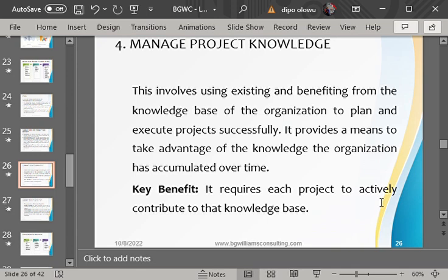Is it in alignment? Let me analyze it. What is the implication that we have this in alignment or we don't have it in alignment? It becomes work performance information. So that information is what he acts on. After he has done the analysis, he has done the comparison, he has analyzed to check if it is in conformance, that becomes what? Work performance information.